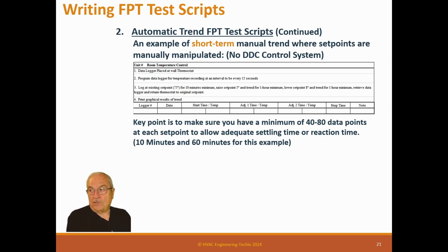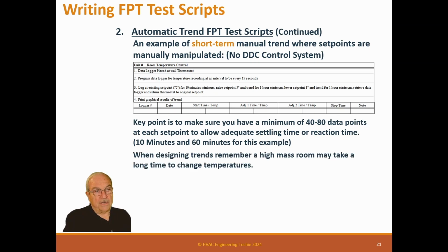Key point is to make sure you have a minimum of 40-80 points, each point allowing an adequate settling time or reaction time, 10 minutes and 60 minutes for this example.